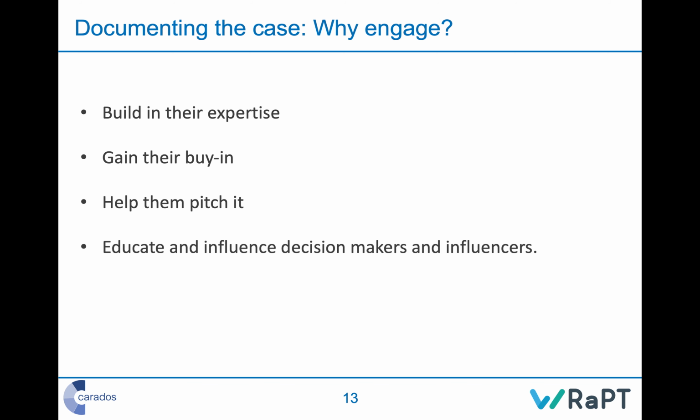And finally, one of the reasons why you may well need to engage people in the investment process is that sometimes an investment process can be quite complex, and you might need to educate and influence a number of decision makers and influencers over that decision. So decision makers are the people that actually make the decision, hence the name. Influencers are people that influence the decision, hence the name, but they don't actually make the decision themselves. You may need to build a communications plan for each of those to make sure that you are talking to each one and making sure you're getting the right investment.